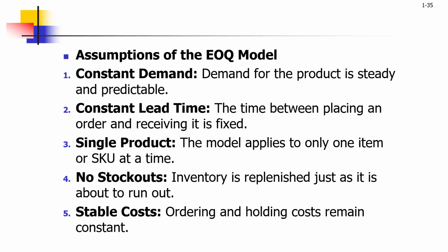There should be constant lead time. The lead time is how long it takes when you order your products, and then when you receive your inventory, or your stock, or your material item. Normally calculated in weeks, or you can calculate it in months or days. So if you have 3 weeks, for example, to receive an item, then you should know that when you order the product today, you're not getting it today, you are getting it somewhere 3 weeks from today. 27th of January could be middle of February. So if by middle of February your product will have depleted completely, it means the lead time must be shortened so that you can get your products in on time.